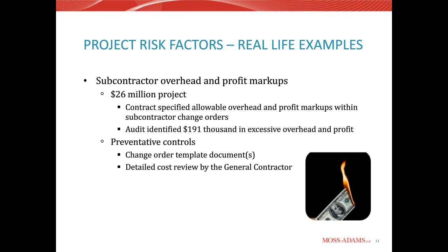Also, a detailed review by the general contractor of any subcontractor change orders should be conducted. They should be reviewing sub changes for, obviously, scope. You want to make sure that the scope is in line with the project needs. You want your general contractor to review it for labor rates. You want to review and ensure that everything they're including within their change order is necessary. You don't want to see any excessive costs related to